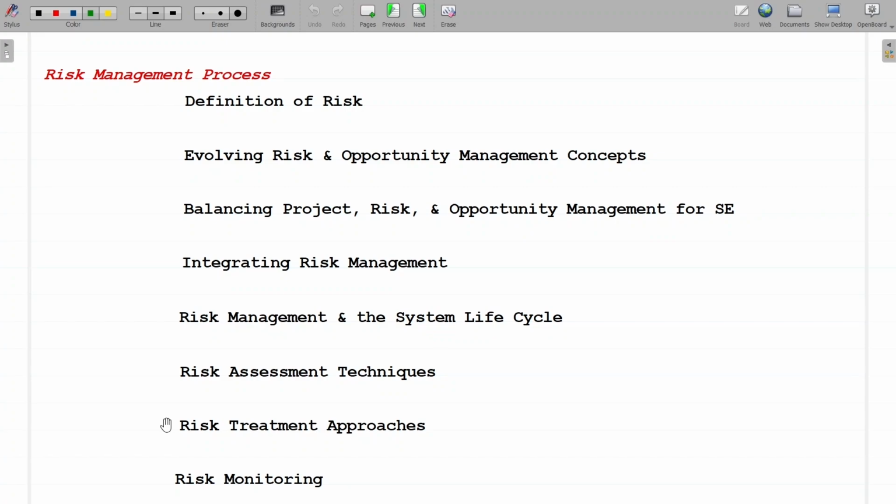The following are some of the steps that can be taken to avoid or control unnecessary risks. Requirements scrubbing. Requirements that significantly complicate the system can be scrutinized to ensure that they deliver value equivalent to their investment. Find alternative solutions that deliver the same or comparable capability. Selection of most promising options. In most situations, several options are available. A trade study can include project risk as a criterion when selecting the most promising alternative.